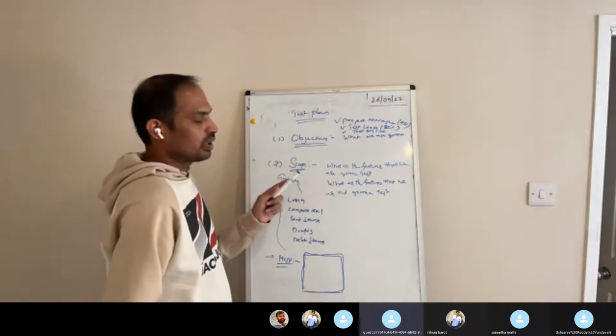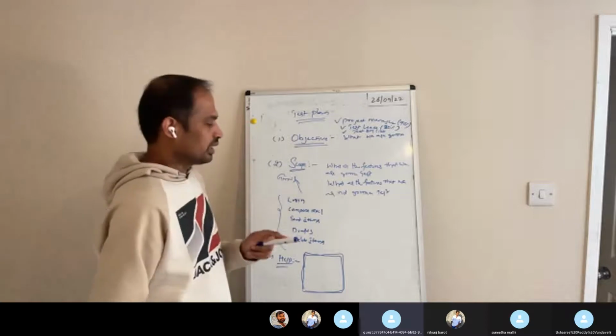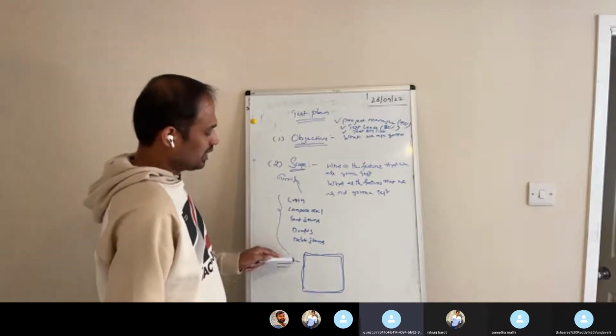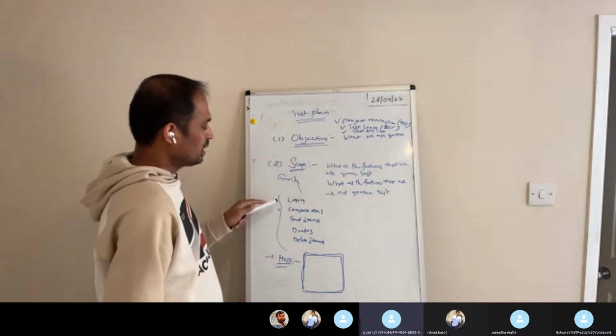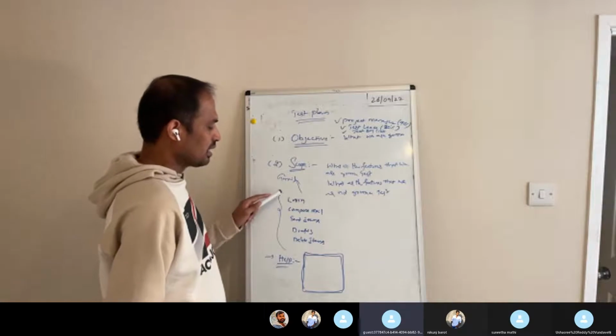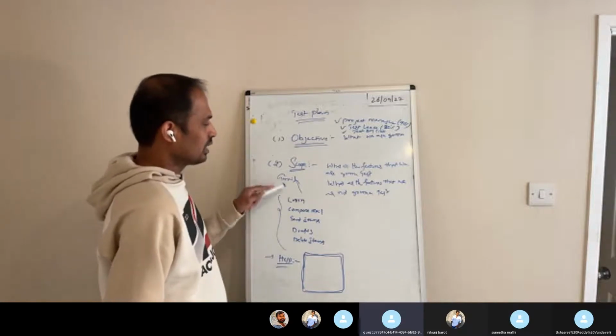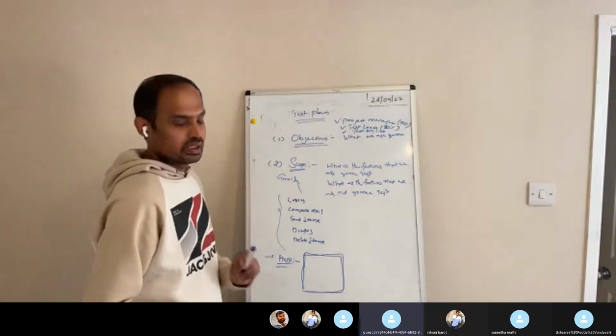And scope is we are going to discuss what all the features that we are going to test, and what all the features that we are not going to test. So we are going to clearly mention in the scope the features we are going to test. For the Gmail application: login, compose mail, sent items, drafts, delete items. These are the features that we are going to test in this Gmail application, and help is the one which we are not going to test.